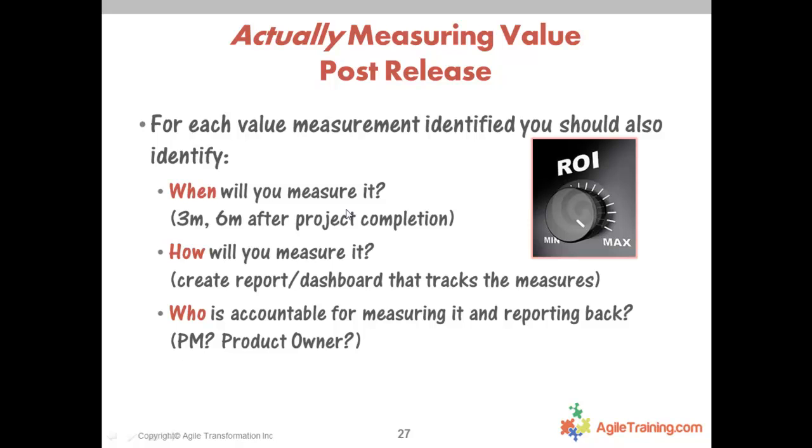When will we measure this value that you just promised? 6 months, 3 months after project completion, when? How will you measure it? Do you need a report? Are you going to run a survey? What are we going to do? Because that might be added to the backlog of work that needs to get done. And then who is going to be accountable for reporting it back? That's a promise and a plan that you need to come up with from the very beginning so we can execute on it at the end.